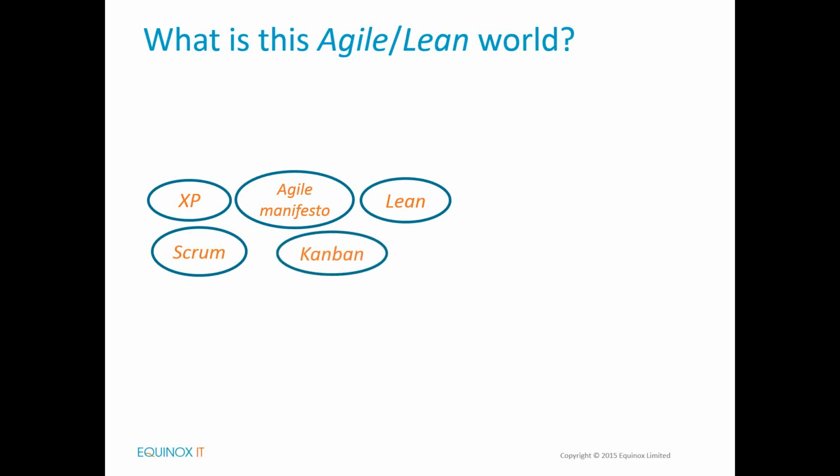Then further evolution involved bringing in the ideas from Kanban, made by a guy called David Anderson. Kanban is based on what's known as complex adaptive systems, and it reinforced techniques such as visualizing workflow, limiting the work in progress, and a pull model for workload management.